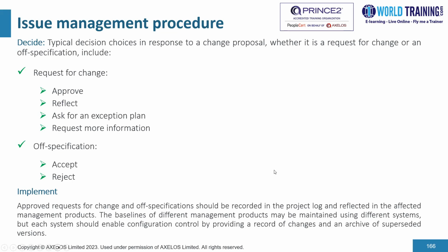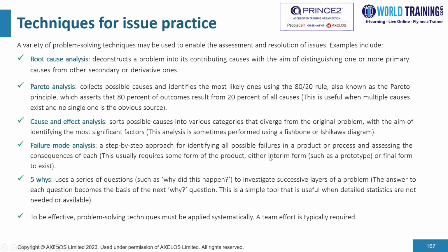Now let's examine some techniques pertaining to this practice. A variety of problem-solving techniques could be used to enable the assessment and resolution of issues. Examples include root cause analysis. We use this technique to deconstruct a problem into its contributing causes with the aim of distinguishing one or more primary causes from other secondary or derivative ones.